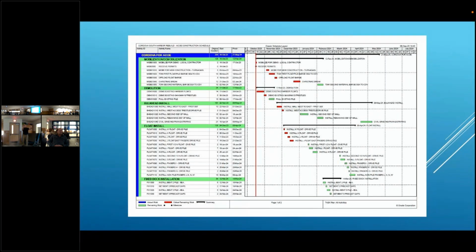But obviously that whole operation is just going to start creeping east as we start moving stuff down. And then at some point, we'll be occupying multiple lots. So that's a real challenge, because we have to keep Nickoloff Way clear for most of the winter, because we have all that upland civil engineering work to do. So it'll be busy down there for sure.